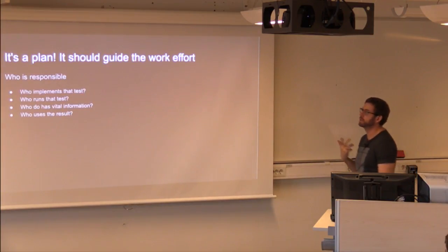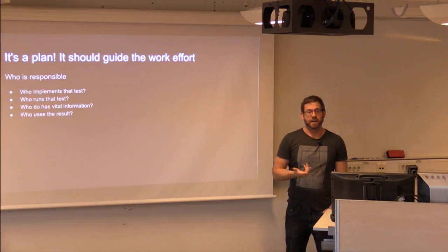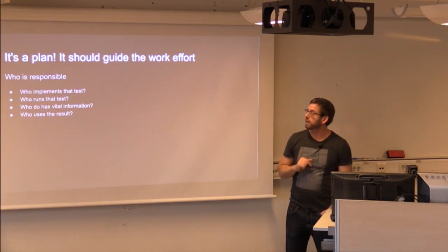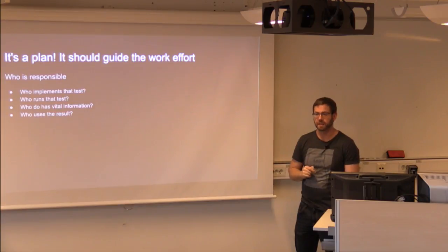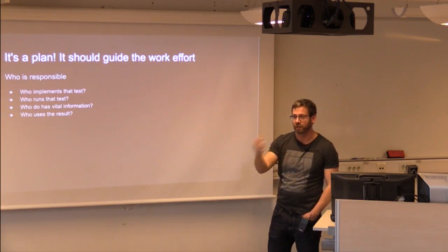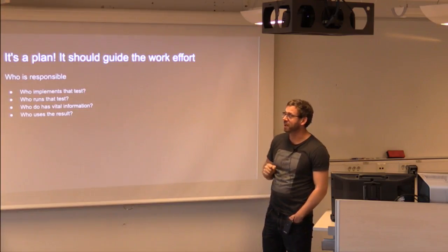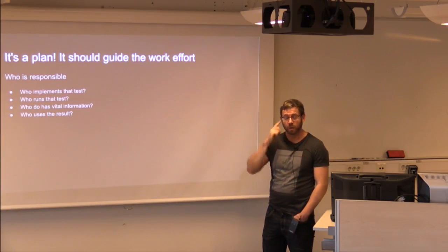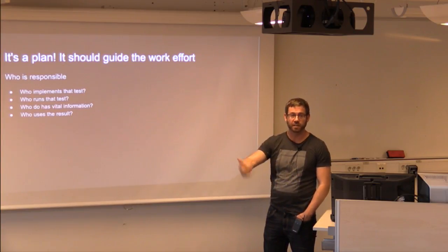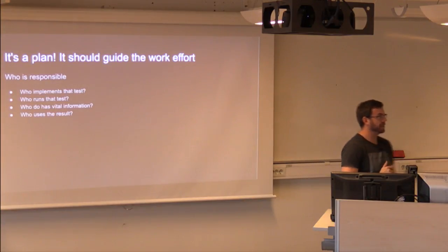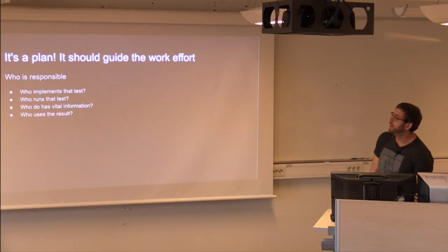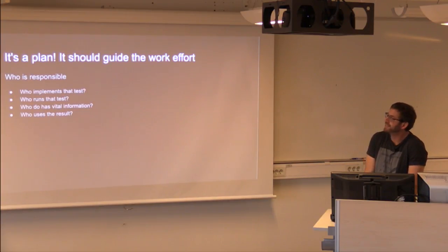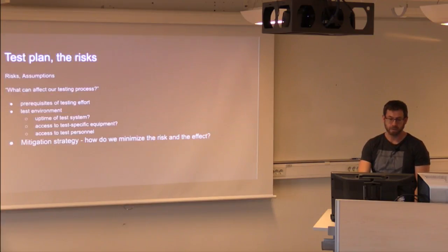And therefore, you need to not only specify all the things that you're going to do and how long they're going to take. You also need to say who is responsible for each task. If you're going to plan something, you need to assign means to someone to do something, and you also need to assign someone who is responsible for this. So by Thursday, Daniel should have done this and that. And his means could be that he has these tutor instructors that he can assign. So when you decide who's going to implement a test, you also tell who is responsible for that, and perhaps also when it's going to be done.